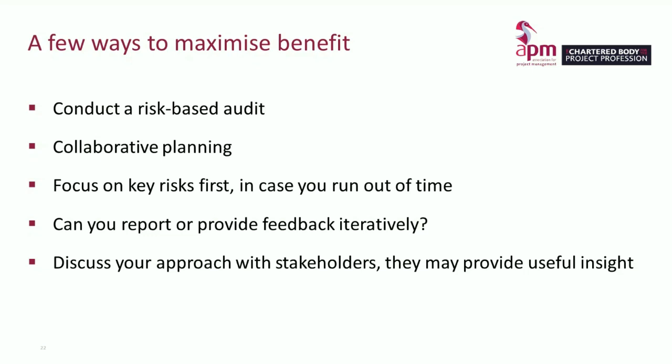And why not consider reporting iteratively? Often an audit may take 2 to 3 months, and it is common that people wait until the final audit report to provide their feedback. But why not provide it iteratively, whether in written form or just verbally? That way management can start working to address any weaknesses whilst the audit continues. And discuss your approach with stakeholders throughout the audit process. Obviously, if you keep communication and you keep using the knowledge and understanding of stakeholders, an auditor will get useful insight from that.